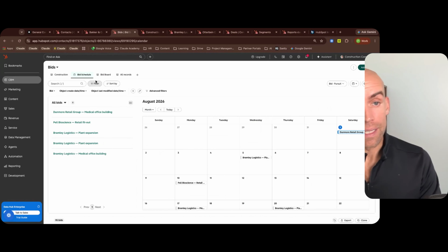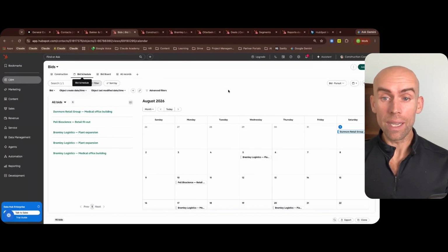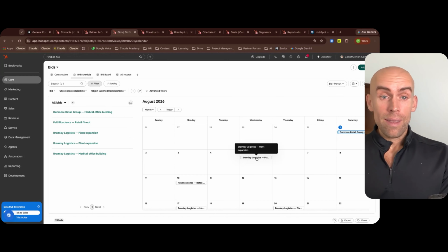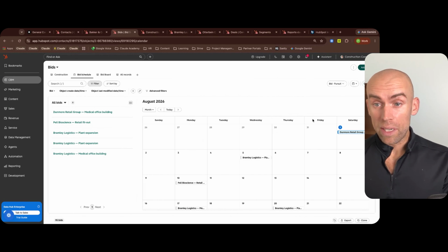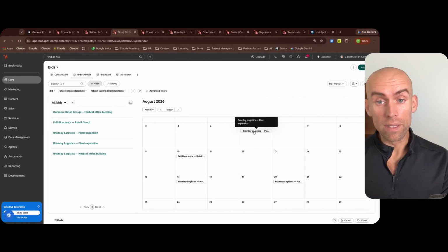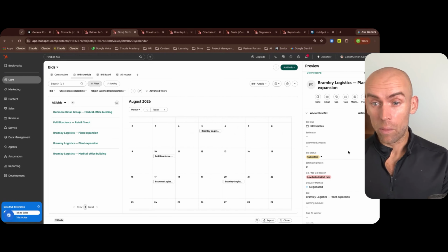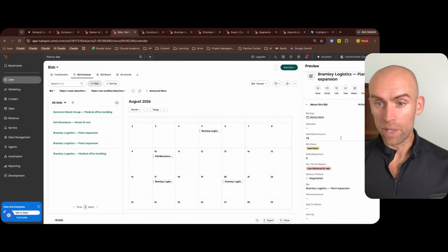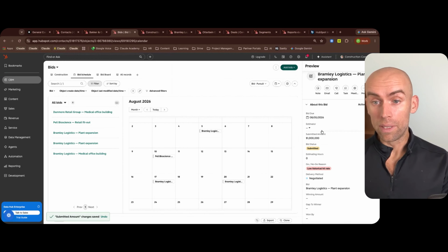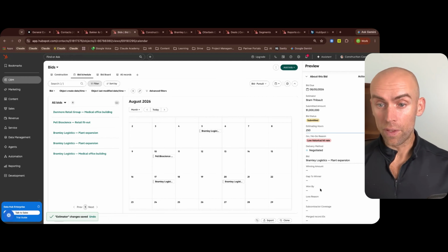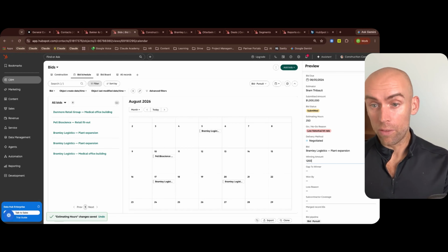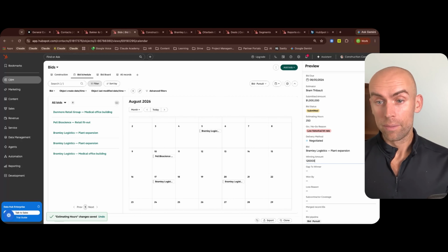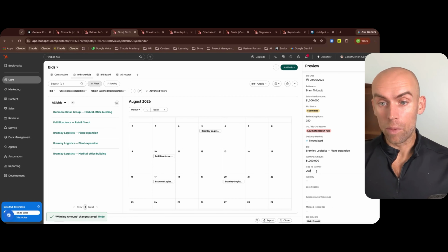Okay. And then finally, I can see these same records again in a different view on a bid schedule. So, right, this is all going to be based, for example, on the bid due date. So I want to see when all the bids are due for all of these different projects and for all of these different bids. And I want to be able to click into it and say, oh, this was our submitted amount. We submitted for $1 million. Who's the estimator? It's Bram. What's our estimating hours? 250. And then if it was won or not, what was the winner amount, right? Was it 1.2, right? And then the gap, obviously, that would be calculated.